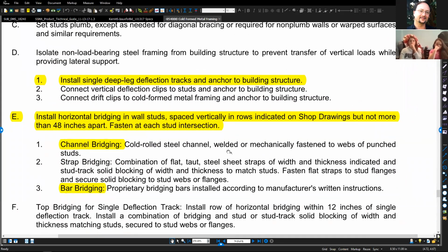It'll refer to things as shop drawings. So let's talk a little bit about what a shop drawing is. The architect provides drawings. Anything specific to a subcontractor or to the general contractor, where they're going to provide additional detailed information, is referred to as a shop drawing. A shop drawing is any drawing or any bit of information particular to someone's scope that's being added into and enhancing the set of drawings.